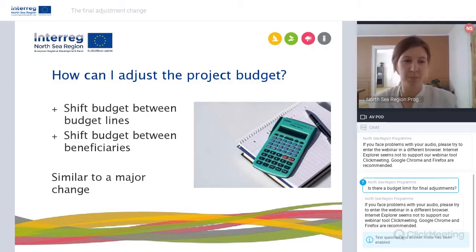So in short, the possibilities are similar to what you can do with a major change, if some of you have already submitted that, with the only difference that you can only adjust financial aspects of your project and not any content-related aspects which you are able to adjust with a major change.